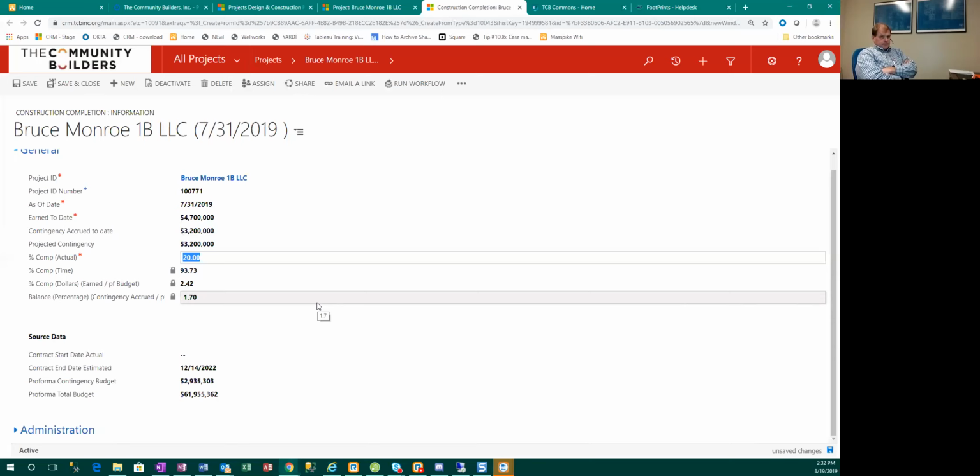So it's a little tricky, because is there a place where the contract value is updated by the amount of change orders we are adding? In order to do this right, you would have to work with your development project manager for them to go and update the contract value. They should be doing that anyway. As we approve change orders, that should update the contract value so that theoretically it all stays consistent.